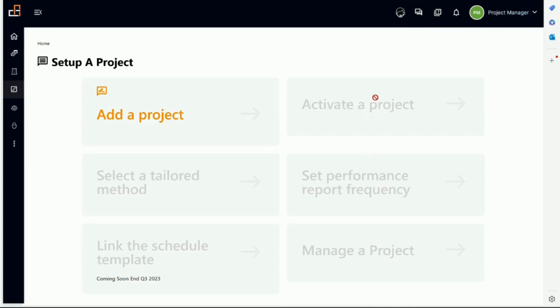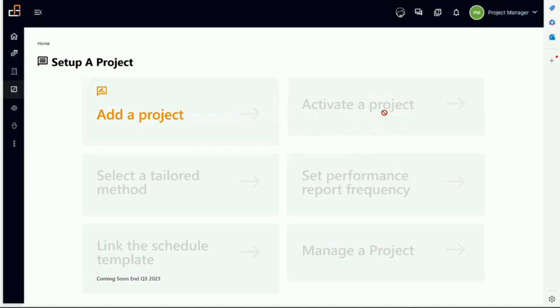It has to be activated by a sponsor. And you notice right now, obviously everything is gray here because we don't have a project to be activated yet. Now activating a project, it's something where a senior manager has to do, which would typically be a project sponsor.